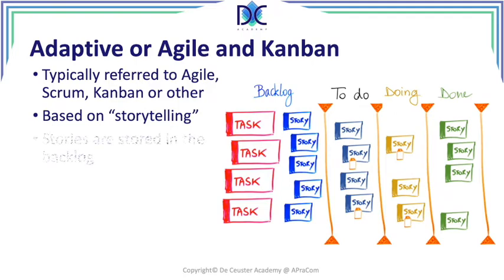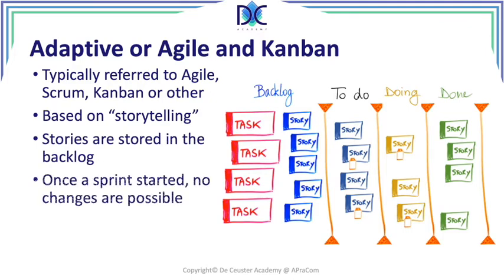We create, in fact, from the backlog, the stories that we have to do. So when we have Scrum, we start the sprint and we put all the stories in the sprint until the sprint is finished. And during the sprint, we don't have any changes because we identified what was necessary to be completed during the sprint. And then we finish that, we reevaluate, and we start again.